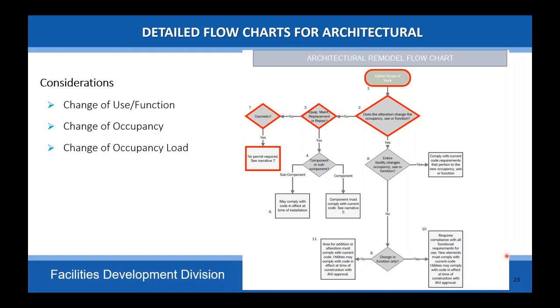But this is more of a courtesy. You can repaint. We've actually gotten projects in that were 100% cosmetic. We do not require a permit for that type of work. So again, just notify the compliance officer, and talk with them if you have any concerns about it.